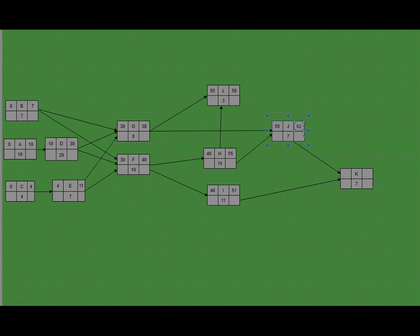Task K depends on task I and task J, so the latest of the three is 62, and then the early finish of task K is 69. This is the last task for this project. To find the late finish of the last task, its early finish must equal its late finish, so here we have 69. To find the late start, you take the late finish minus the duration to get the late start.